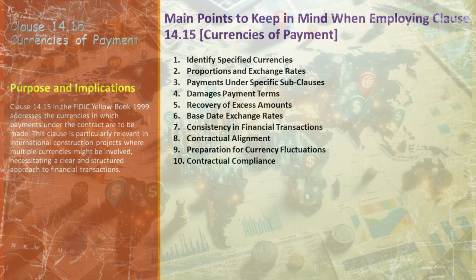Be aware of the clause's provision for recovering excess amounts in any particular currency from payments in other currencies. If no exchange rates are specified, the rates prevailing on the base date as determined by the central bank are applied. Ensure consistency and clarity in all financial transactions, including interim and final payments, as per Clause 14.15.